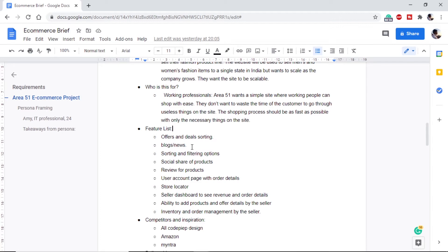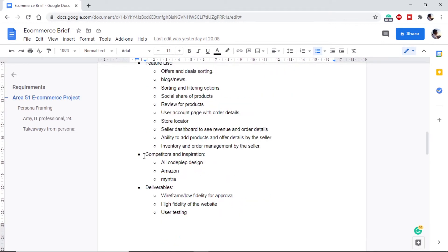The specific features we included are: offers and deals, sorting, blogs and news, product sorting and filtering, sharing products on social sites, product reviews, a user accounts page with order details, a store locator, a seller dashboard showing revenue, ability for the seller to add products and offers, and ability to manage orders and inventory through the dashboard. These are features included beyond the common ones. Next, in competitors and inspirations, we include where we took design inspiration from and who the competitors are — Amazon and Myntra are inspirations and also competitors.